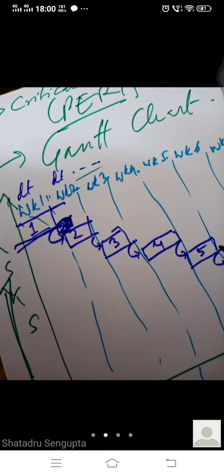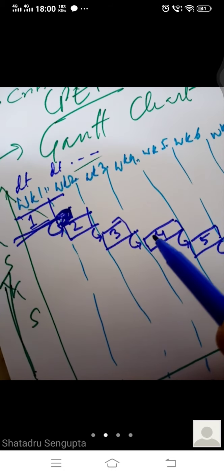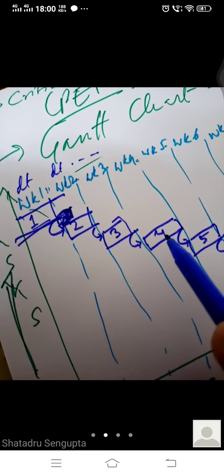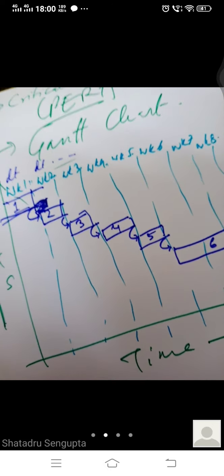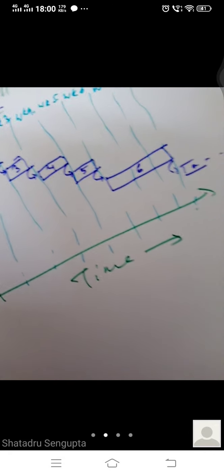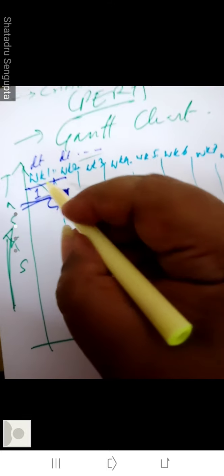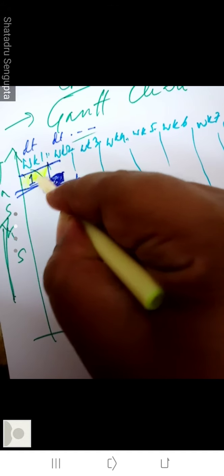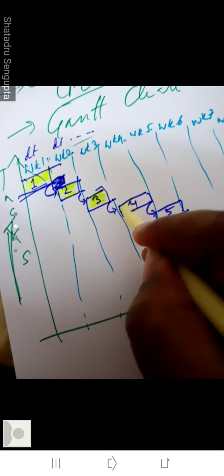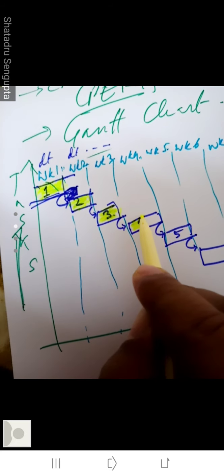Now this is it. Now say, why are these hollow? Because these have not been completed yet. Let's say we are at the middle of say week 4. So the middle of week 4, if this goes according to plan, then we have already finished 1, 2, and 3, and 4 we have done up to half. This will be shown like this. These Gantt charts, the tracking Gantt charts, we can actually track the modules. So how do we do that? These are filled up. This means these have already been finished, and this will be half finished. So only half of it is filled.